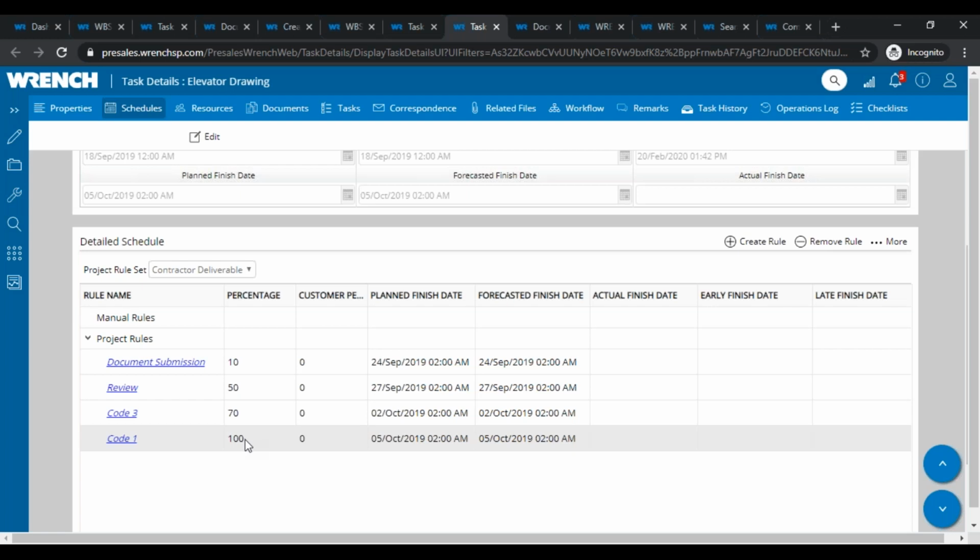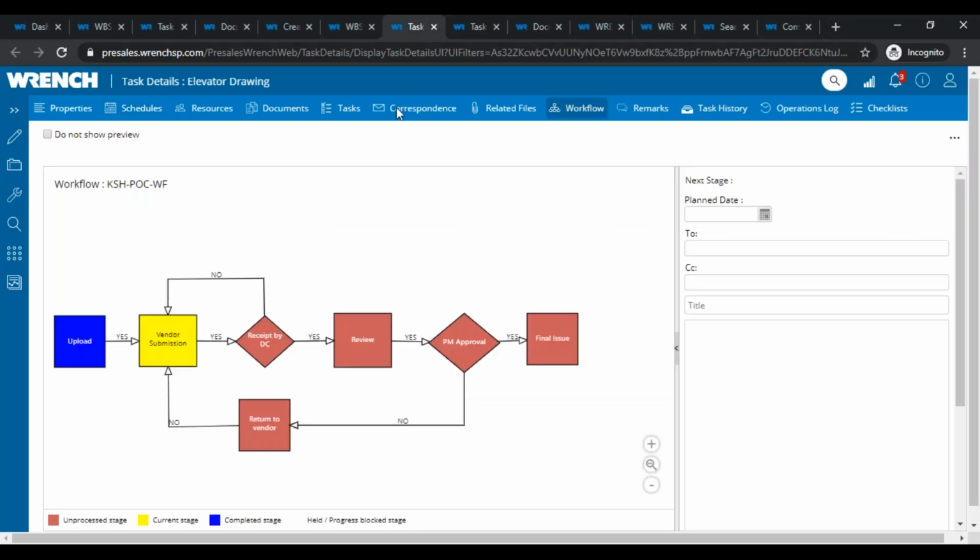But what we have understood is, in any large capital project, the most important thing is you need to get all your documentation which is related to the drawings and documents issued on time. And from our experience, what we have heard from project managers, if we can issue all the drawings, say 5% earlier than the project, the probability of the project getting delayed is very low because the rest of the activities can be taken care of. And this is the basic input which is required for doing this. So now let me walk you through this process of how actually this happens.